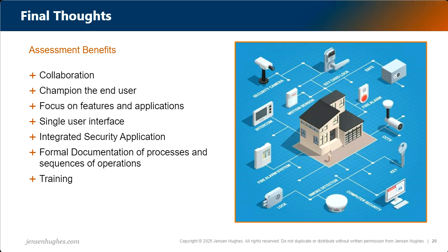I can tell you that typically a door hardware collaborative process and an electrical contractor collaborative process is absolutely required. We want to make sure those drawings reference those other drawing sets, or more importantly, equipment schedules, so that we reduce scope overlap or scope gap.